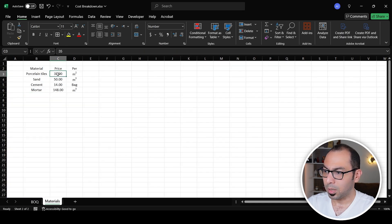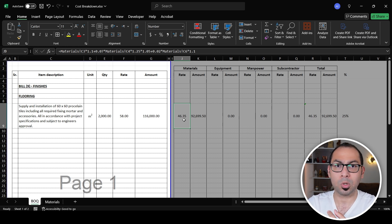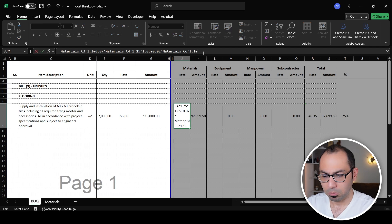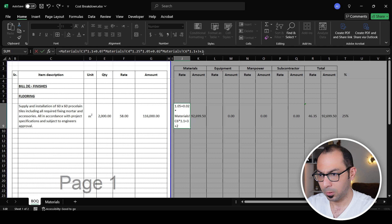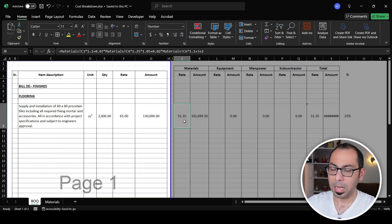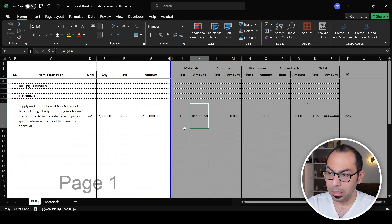So the supply rate for tiles is 35, but after including wastage, sand, and mortar I'm getting around 46 — about 11 more than the tile supply price alone. I'll also add 2–3 for grouting and 1–2 for spacers, bringing the total material rate to about 51 per square meter, and 102,000 for the full 2,000 square meters.